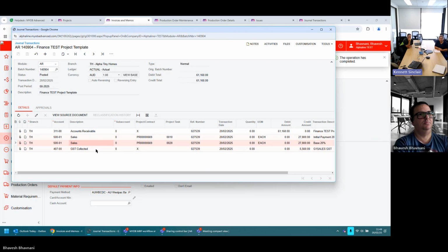So what's happening is, as you invoice it, it goes into revenue, but no costs go to cost of goods sold. Correct. Goes to WIP, is that right? Yes. Could you run a profit and loss at the end of the month, and it would show $500,000 in revenue because it's a job worth 600,000.